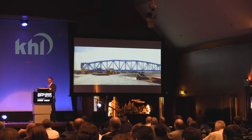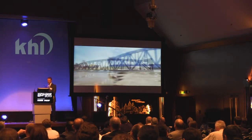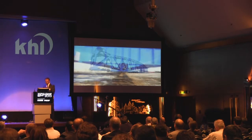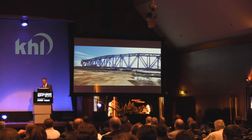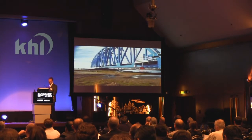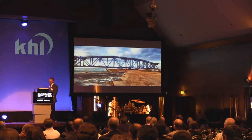Plastic mats were brought in and laid down to cover the muddy yard. Once the road was complete, the transporters were then positioned under the supports the bridge was set upon. The bridge was then secured to the transporters and transported across the yard utilizing two separate trailers programmed to operate in unison. Since we were on a limited schedule, Burkhalter took the added precaution to contract for an on-site Goldhofer technical assistant to be available to help resolve any equipment issues which might arise. As a result of Burkhalter's preparation, no mechanical breakdowns occurred and the technician's assistance was not required.